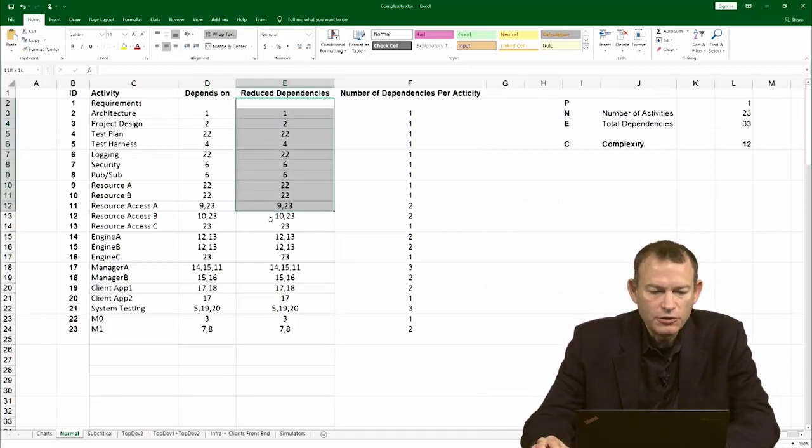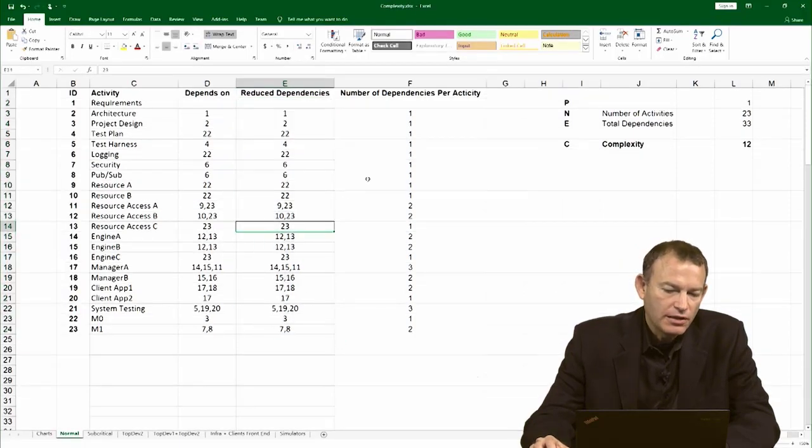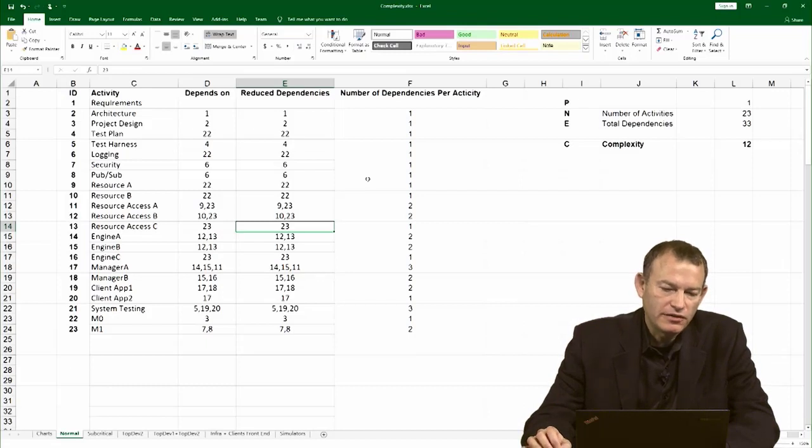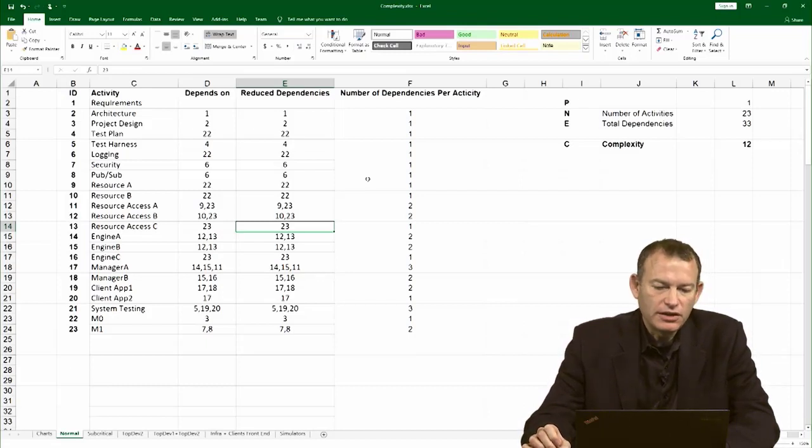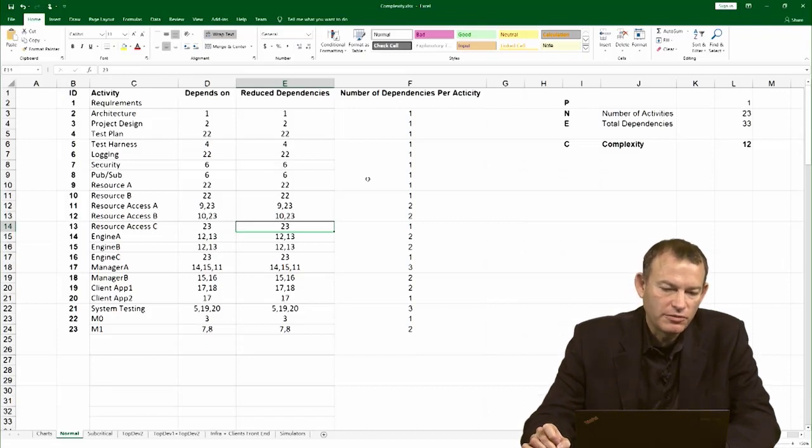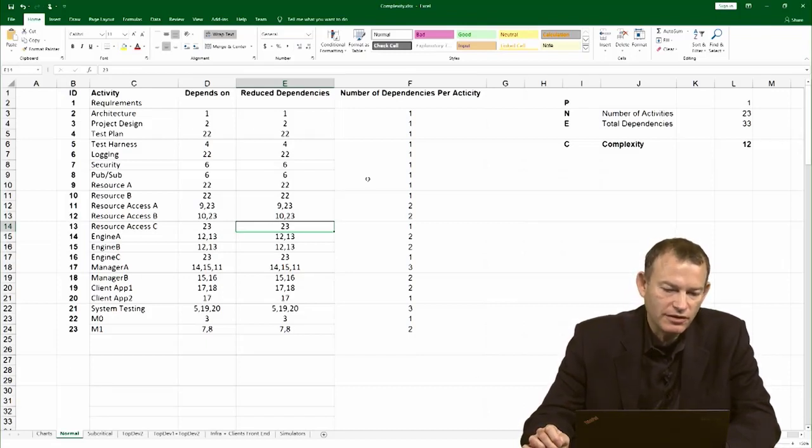So, you carefully go over the network and you come up with the most reduced dependencies. Now, quite often you actually want to have additional dependencies in your project file or even Excel in case you have resource dependencies or some dependencies that are important from the semantic of the network. But for complexity, you have to remove them.